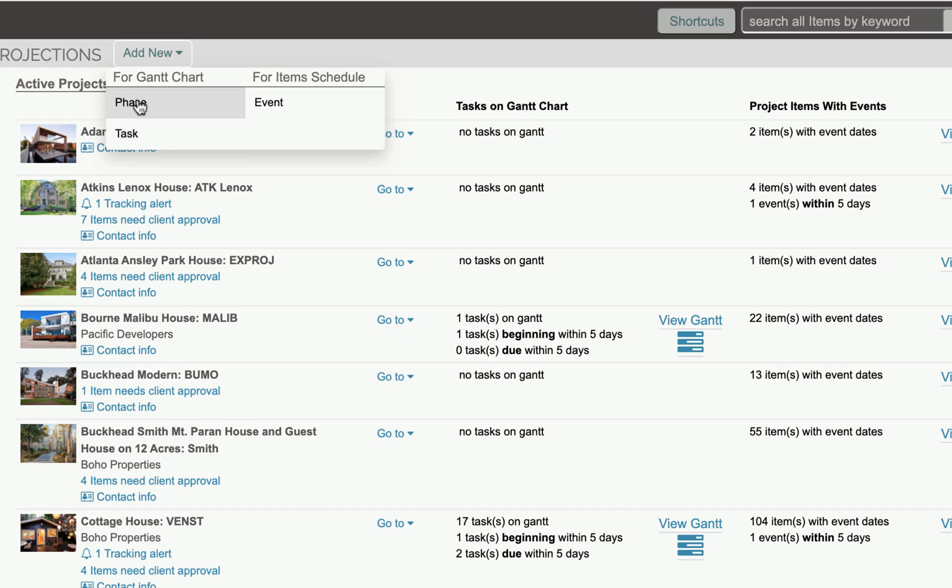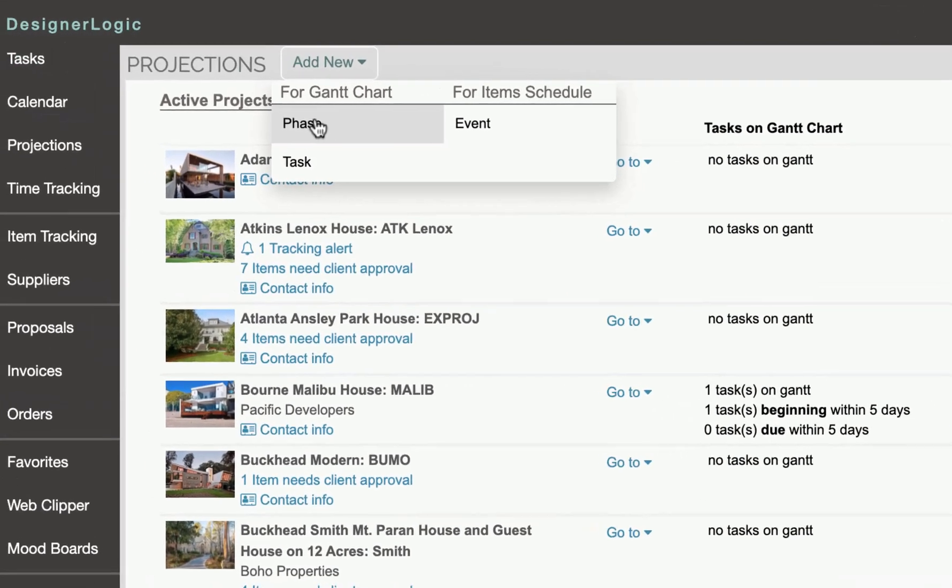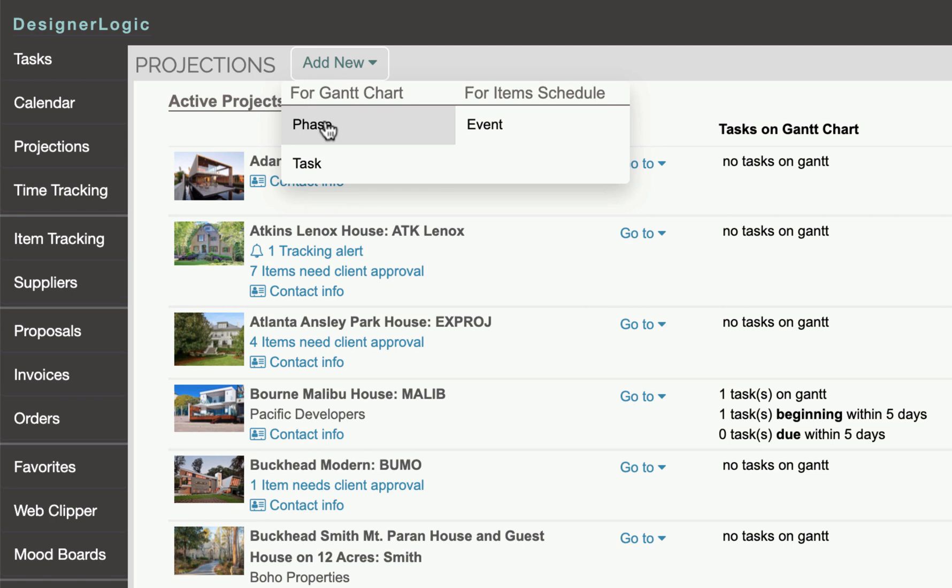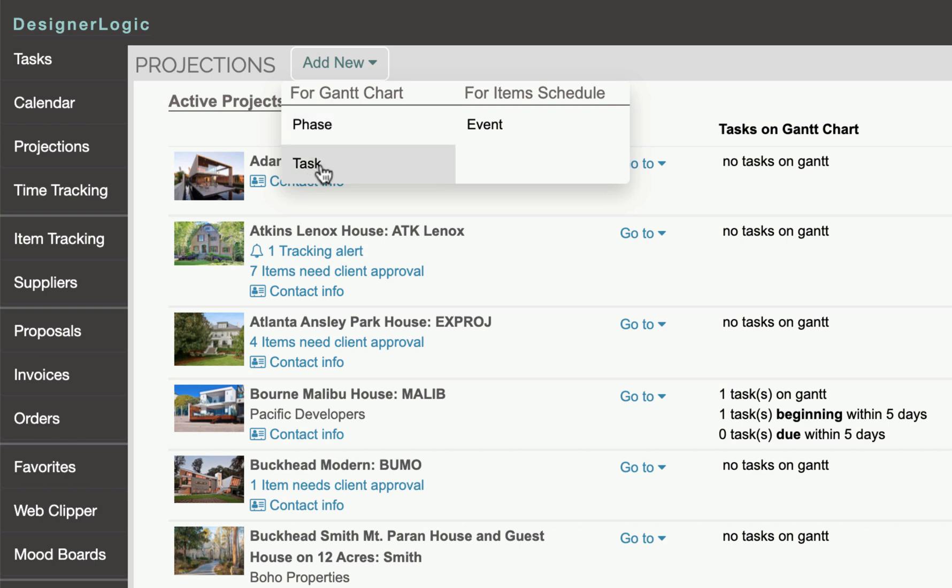The phases are basically groupings of a project. Usually projects have things like Phase 1, Phase 2, Phase 3, or something like specking a project as a phase, demolition might be a phase, presentation to the client might be a phase. So you want to make sure that the project has a phase so that you can put tasks on that phase because that's how they go in the Gantt chart.